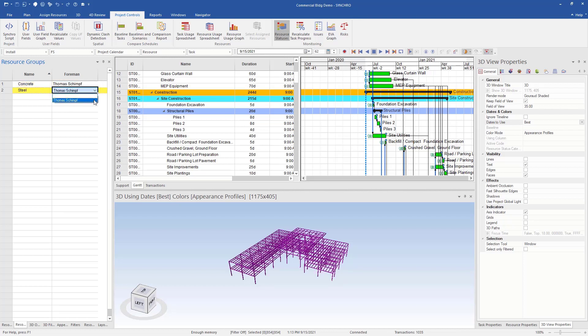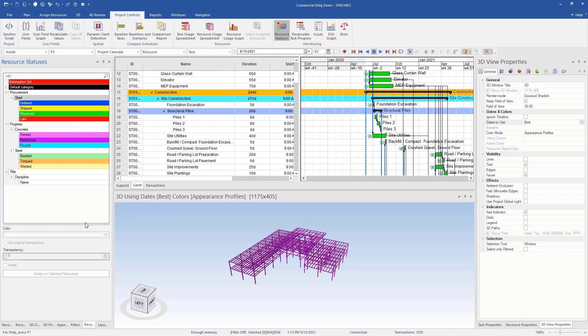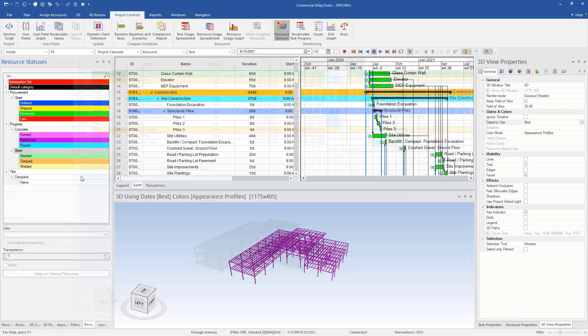Lastly, we're going to want to assign our resource statuses. A simple way to do that is you have your resource groups already. So for steel, let's select our steel resource group, go to our resource statuses and now I can assign my steel resource statuses to the steel resources. To do that, simply right click, assign to selected, right click, assign status on selected resources.